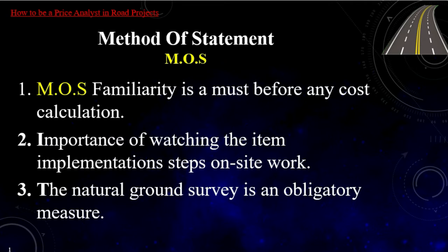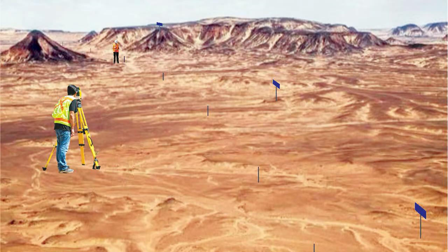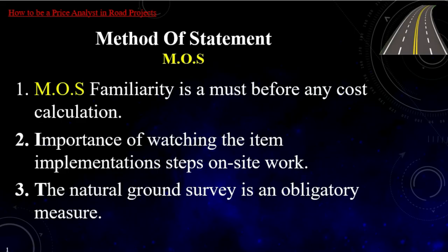Strictly, I would like to declare a severe warning. We must be fully aware that landing any equipment for site work before the natural ground surveying is considered to be a crime, not only against the contractor but against everyone involved in the project, whether the owner or supervising consultant.